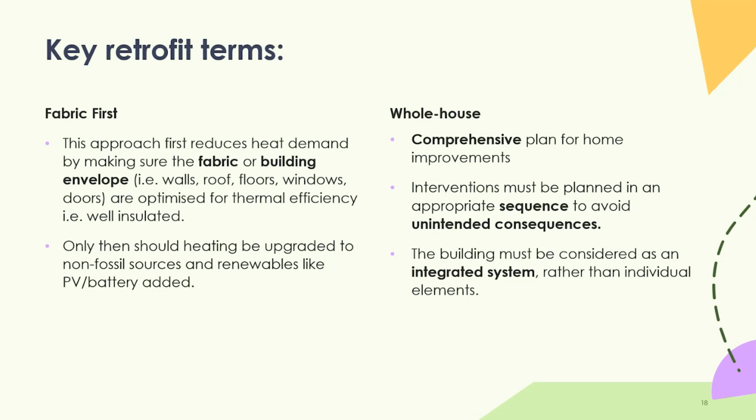You think about the order of the measures that you're going to install and what each one is going to achieve and how that's going to take you towards where you want to be in terms of that space heating demand, the SAP rating of the property, etc. And crucially, making sure that you're installing measures in an order which does not damage or require you to go back and rip things out and put things back in.